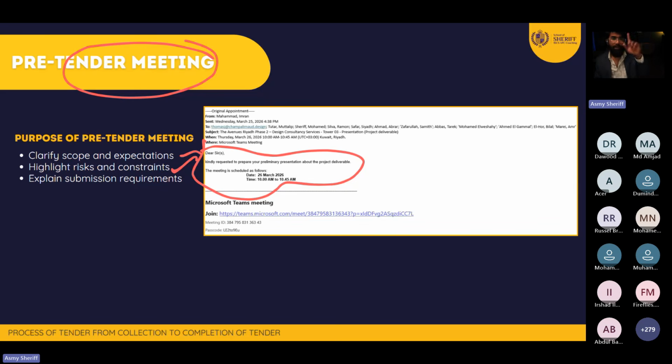So what you need to do, it's always better to make sure that you call these people separately, each and every company separately. Don't disclose them, or don't invite them all together. If you see here, for this design, we invited one company only. We called one company and said, you come, this is your time frame, we will give you a brief about that. Done.